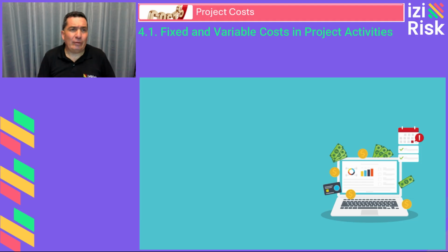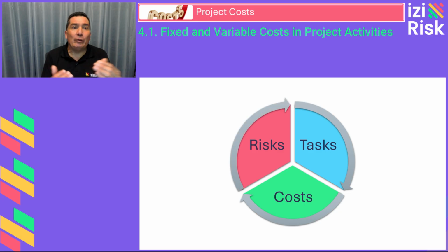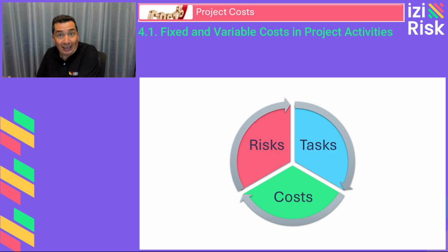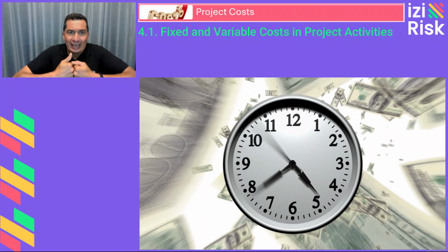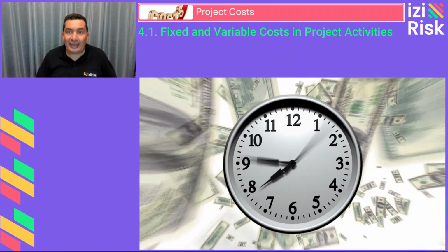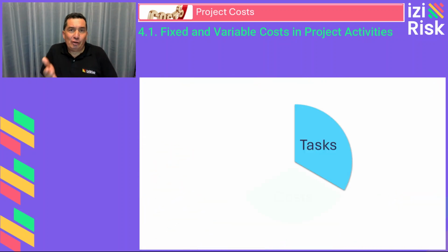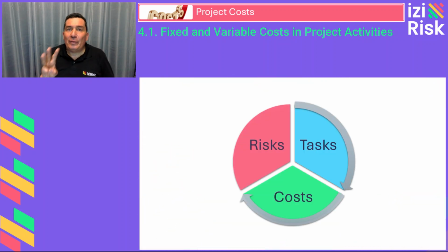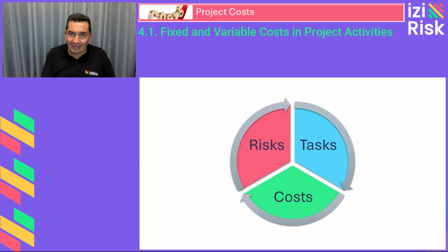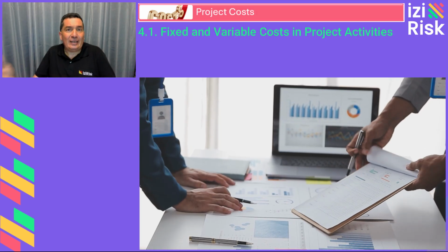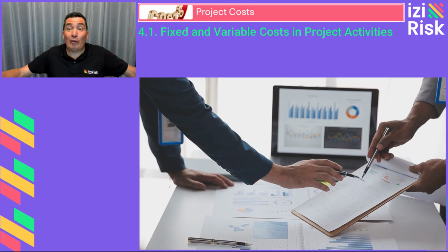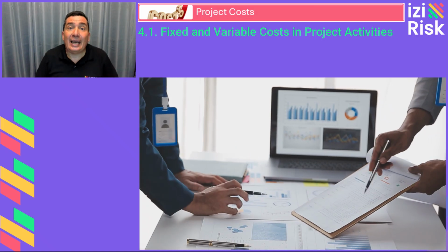So why does this matter? Ultimately, we want to analyze how task durations and costs fluctuate together under the impact of risks. Risks and uncertainties often have a direct impact on task duration, which in turn affects costs. By correctly linking task duration and associated costs to potential risks, we ensure a realistic integration of these three critical elements: the risks, the durations, and the costs. This approach provides a better understanding of project behavior and allows for a more accurate financial and scheduling projection.